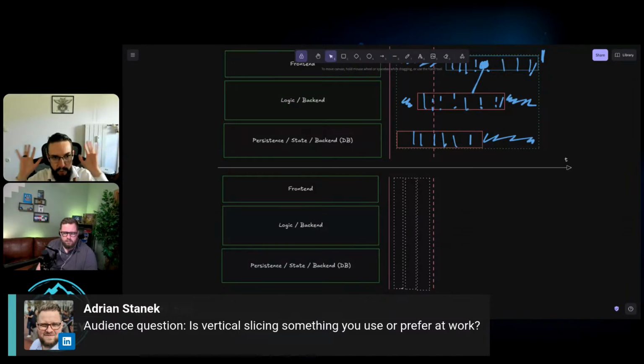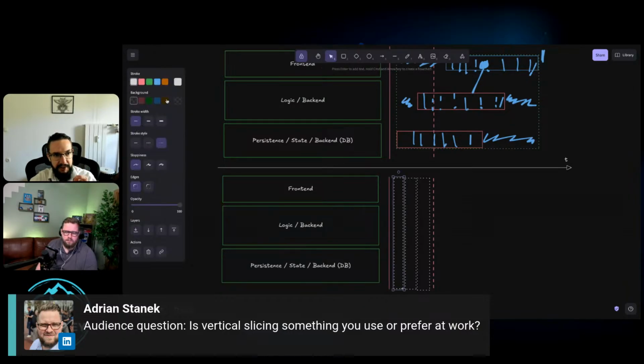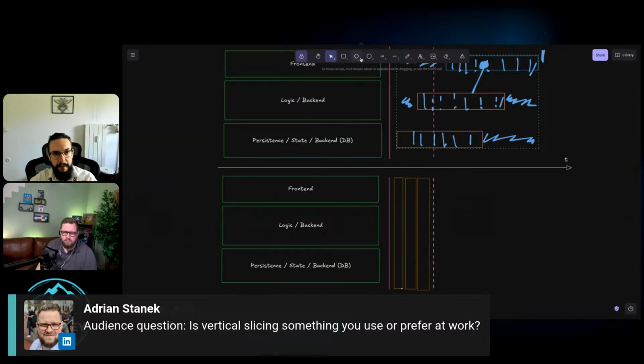So just do whatever you need, like in Jira, do whatever works for your team to communicate what is important, and then work in vertical slices. Now, what does this look like? This means that when we're slicing work, I'll give it a little bit more of a stronger color. When you're slicing work vertically, this means that we need to include something from each layer for each increment.